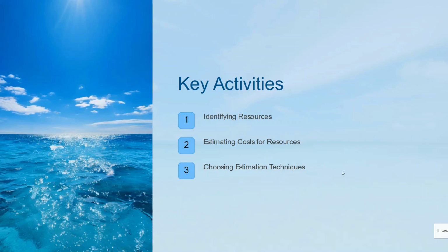Third, we have choosing the estimation technique. We will use different techniques based on the complexity and the data availability, such as analogous estimation, using data from similar past projects. We will also use parametric estimation, based on mathematical models, and we can also use bottom-up estimation.